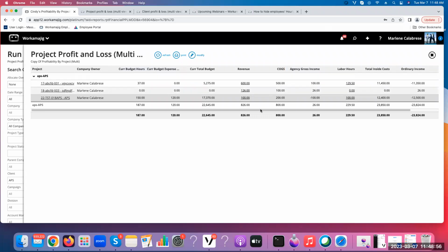So I'm going to pause just for a minute because we have a few more questions. Someone says, can you use a blended employee hourly rate instead of the actual employee hourly rate to reduce the risk of rate exposure? Absolutely, Melody. Great question. A lot of people do that. It works for the larger agencies. Where it falls down sometimes is if you have a smaller agency and you only have two people doing copywriting, for instance, and you don't set the settings to lower the exposure of people being able to find labor net,